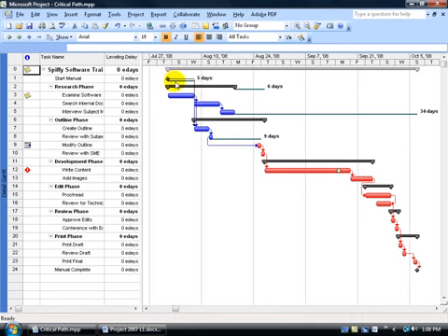Now you can break it down a little bit further. You've got slack time here for the start date of the milestone. It says it's got 5 days before it actually starts affecting this task that it's linked to down below. Because this starts on August the 1st and this task down below here starts on August the 8th. So we could say go ahead and start this on August the 2nd, the 4th, the 5th, the 6th. But if we go beyond August the 8th, which is when this task starts, it pushes that task out, which in this relationship, this link, subsequently pushes this task out.